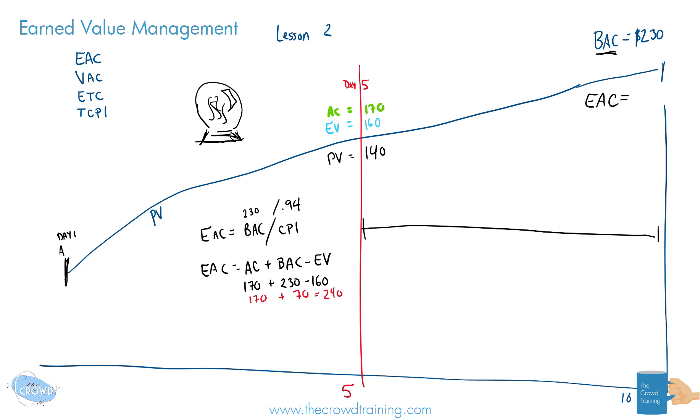Okay, so that's one estimate. Let me use my calculator to find out this one, which would be $230 divided by 0.94 equals about $244. So we're getting different numbers. So let's take $244 here. Granted that, again, this is because I'm using just made-up numbers. Any kind of exam question or the data that you might actually get in your work performance is going to be a little bit different. And also remember I rounded this number to 0.94 in the last lesson, so that's going to also influence what we get.